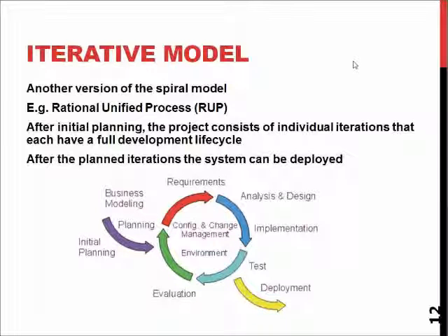So basically all the agile models, or not so agile approaches like the Rational Unified Process, use this sort of iterative approach. It means that we do the initial planning and initial requirements gathering and initial business modeling to get the idea: would this product be feasible? Would it make money to build such a thing? Would it have enough customers to cover the expenses of building it, or is there any commercial activity in the area where we are building something?